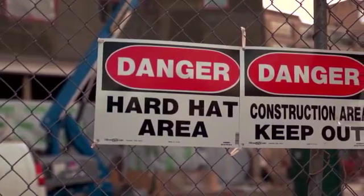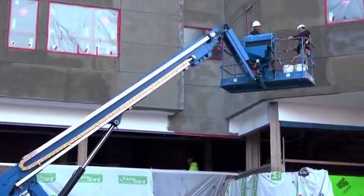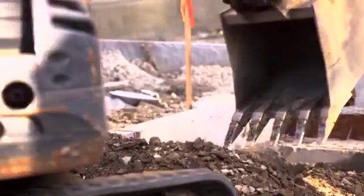If you have a loss, you're going to have the project shut down, which you're going to have a builder's risk issue. You're going to have potentially liquidated damages. You're also going to have loss of rents and income. Those dollars are untold. It would be 20 to 30% of the project, I think, if you had a situation where you brought it down. This is a $16 million hard cost project. You're looking at $4 or $5 million just with the adjacent property damage at least.